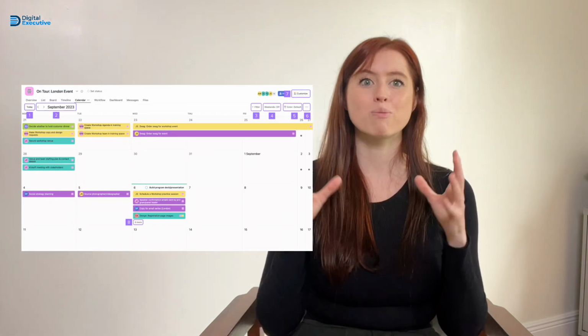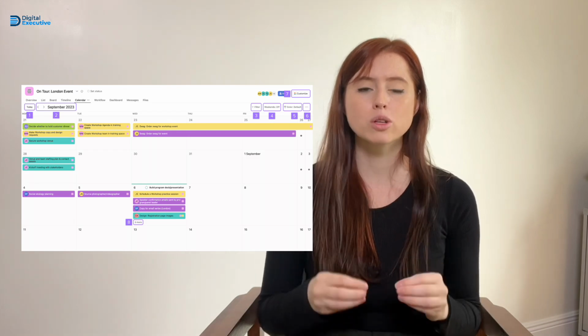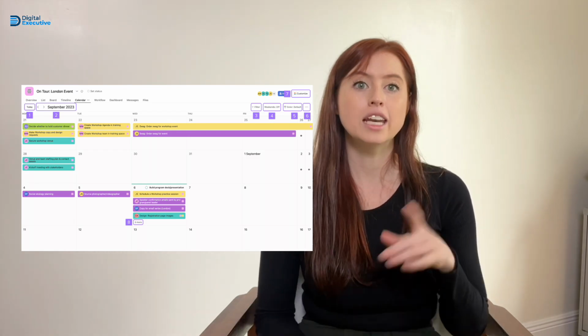And then in Asana, you're also going to want to have a project calendar. So the project calendar is also going to be part of the morning check-in process, and it should only contain the bid project due dates. So they're going to want to cross-reference the board and make sure enough pieces of the board are being completed in time and assigned to the punch list in order to finalize the project. And this should also be part of your assistant's daily task, so that they recognize when a project is getting close and they can either help you slow down and focus on quality, or speed up if necessary.